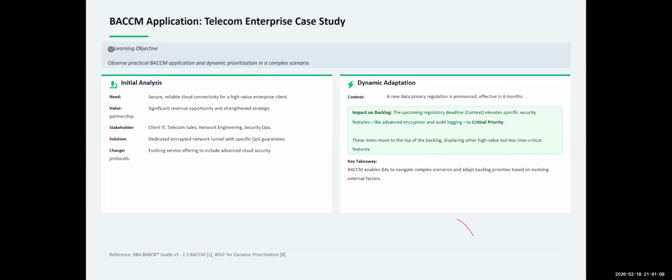So his responsibility here is to ensure that whatever goes into that backlog can be estimated, can be evaluated in terms of value, they are testable, they are not vague. It's easy for you to prioritize, and easy for you to estimate how long it's going to take for them to be delivered. A product owner can decide to just put anything there, right? Then the BA is actually the one responsible for the backlog health management, the health indicator.